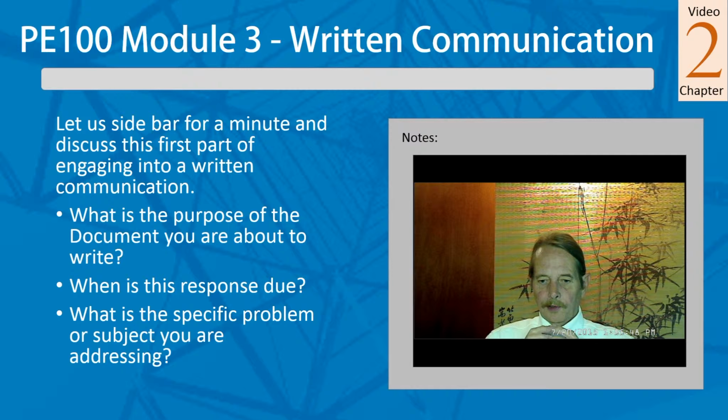You need to make sure that you understand the response time, because timely response is critical for project engineering and management, because these jobs are moving so fast that if you have an issue and you need to have a response due in 2 days, it's usually because if you don't have that response in 2 days, somebody else is going to either cover you up or install work in your way, or something's going to happen that's going to cost you more money to do your work than it would have cost otherwise.